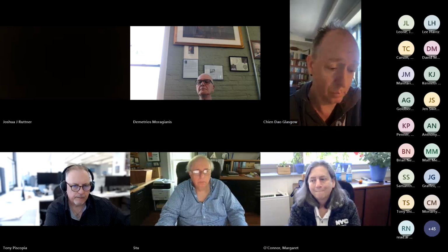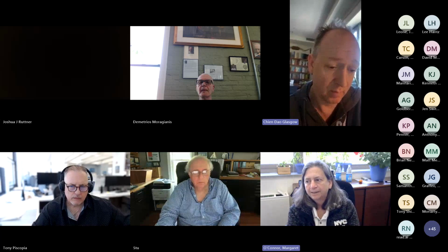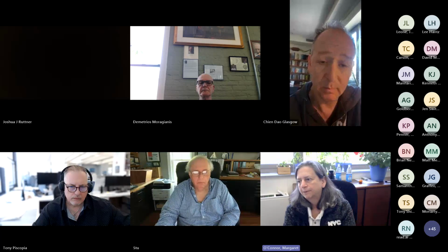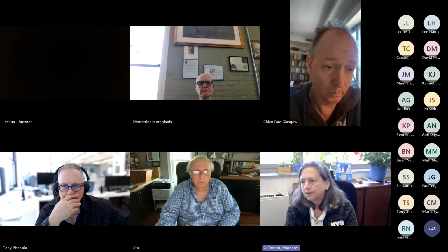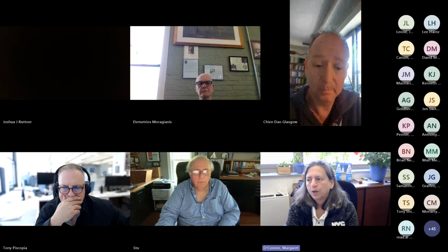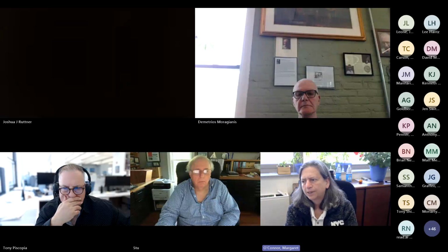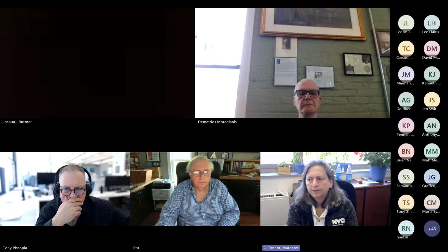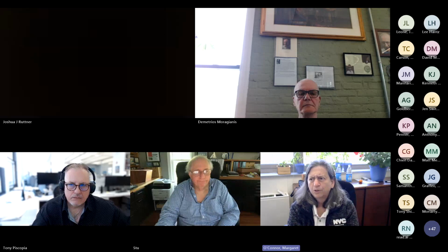Okay. Yep. Yeah, I see a couple of questions in the chat. Can you please walk us through the various inspections required by different parties during CA and closeout? I'm not sure what CA is. Construction administration? Yeah. Okay. So during construction, we have a qualified inspector that's required to inspect the site at least once a week, once every 7 days.